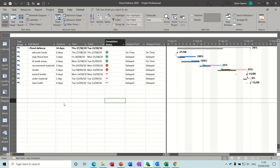On the screen at the moment, in the table you can see there are three columns with custom fields: completion status, a delayed start column, and a delayed finish column. This one has got graphical indicators showing you green for completion, amber for between 25% and 75%, red for less than 25%, and a little dash for anything that's not started.